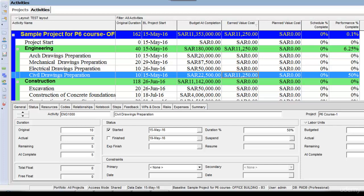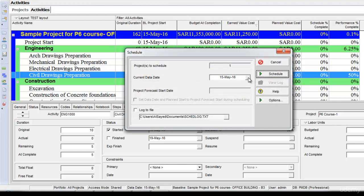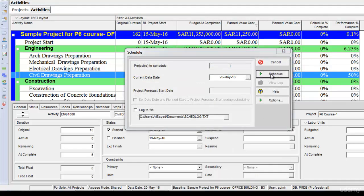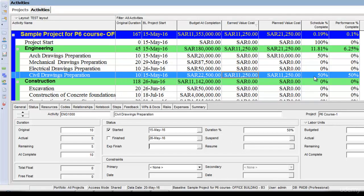Now let's schedule the project. Five days have elapsed out of 10, so I'll select the data date as 20th of May and click schedule. Now the schedule percentage complete also says 50% — five days out of 10 have elapsed — and the schedule percentage complete equals the performance percentage complete. This means the activity is progressing according to the baseline.